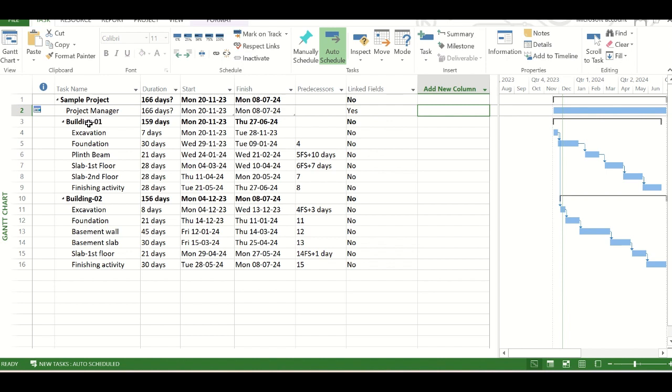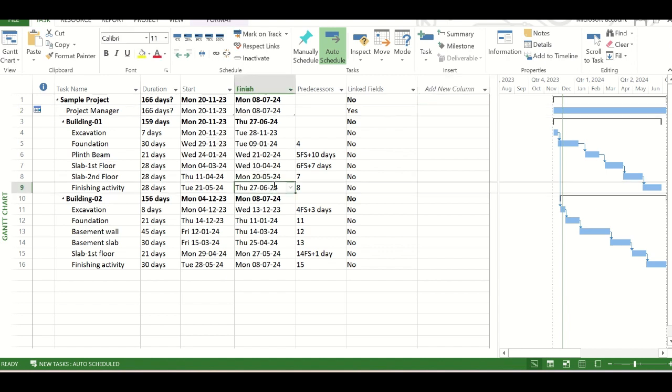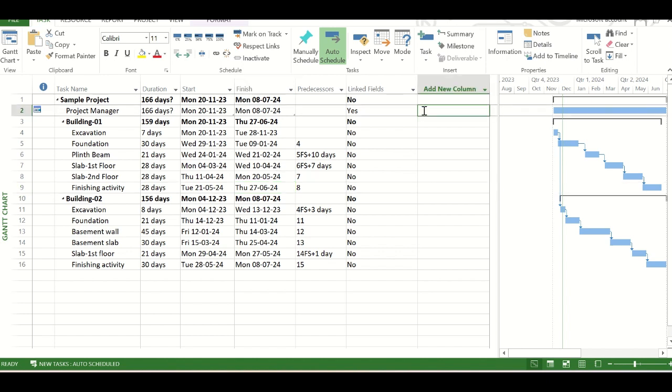If we want to place a site engineer, then we can, for only building one, then we can have a hammock task for only the building one. And it will be named as site engineer. The start date of that site engineer task will be linked to the excavation start date of building one, and the finish date will be linked to the finishing activity of the building one.